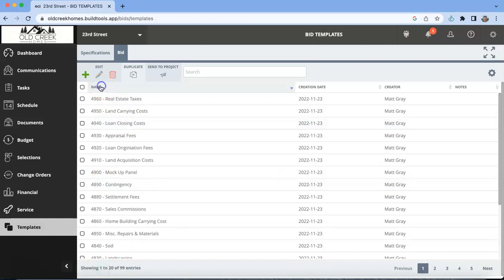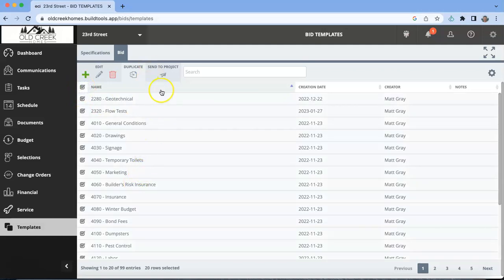And the reason why we're doing this is because we don't want to ever miss a job cost code, for budgeting purposes. At this point in the company history, we really don't have any cost codes that are missed. But if there was, for example, underpinning, which we haven't done much of, and we missed the cost code, then we would create that cost code within the system, and on the next job, you wouldn't miss it. So go ahead and highlight all of these.